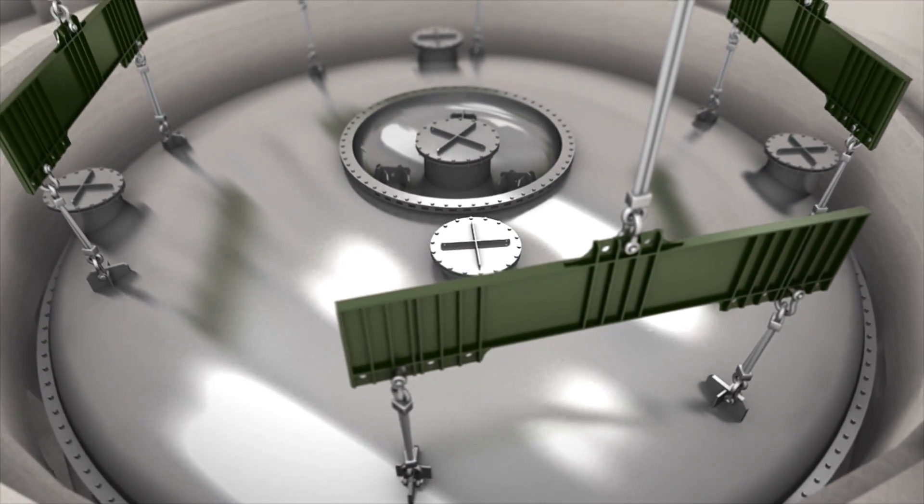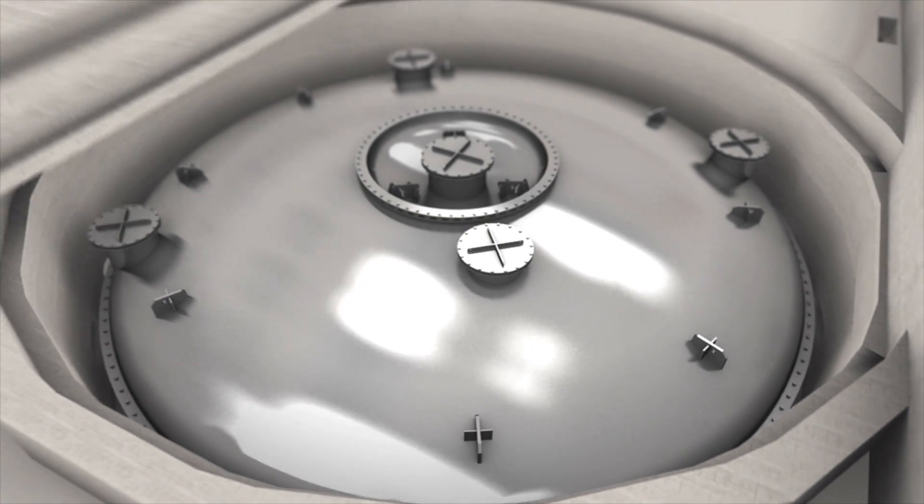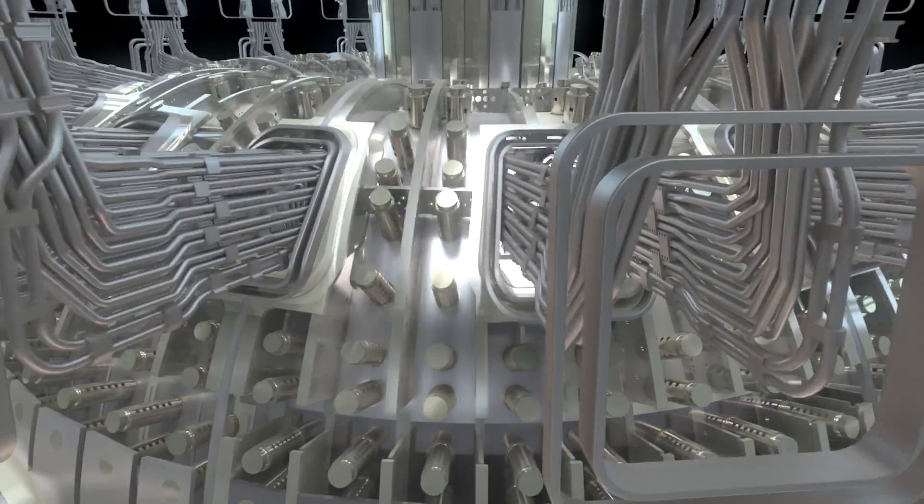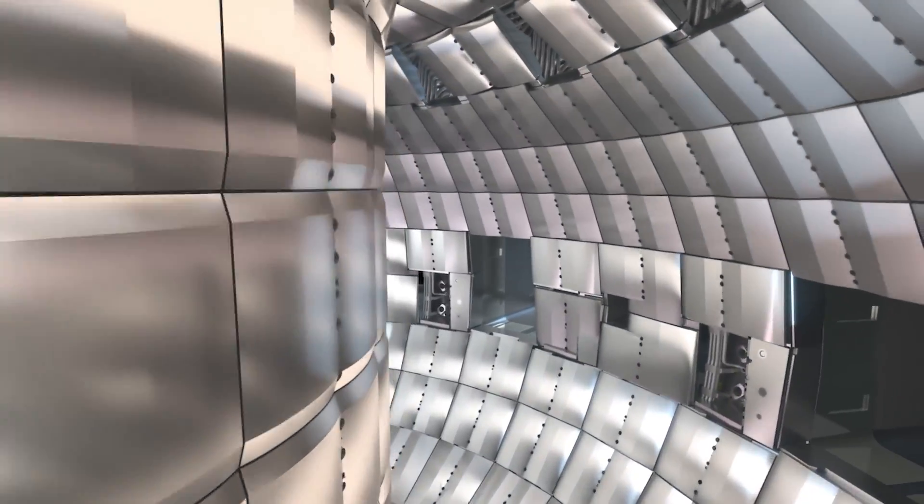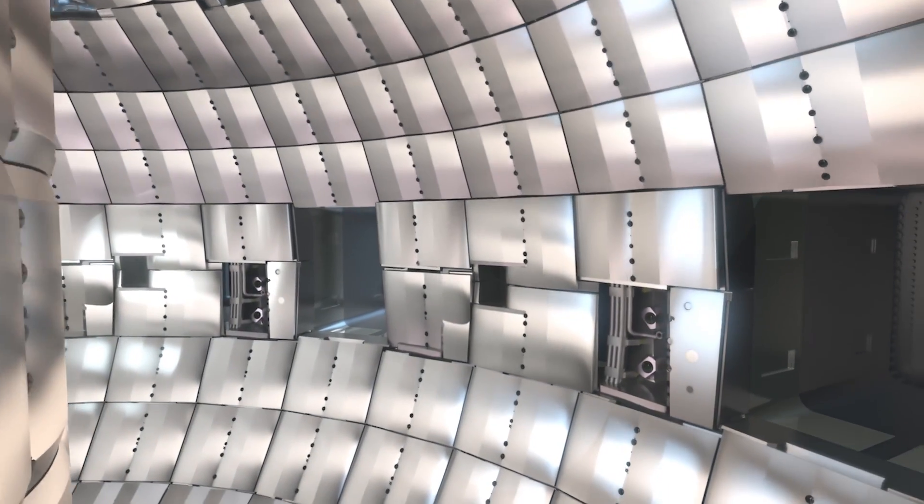The closure of the cryostat by late 2024 will mark the end of the first assembly phase. The ITER machine will undergo one year of integrated commissioning and testing, culminating in first plasma at the end of 2025.